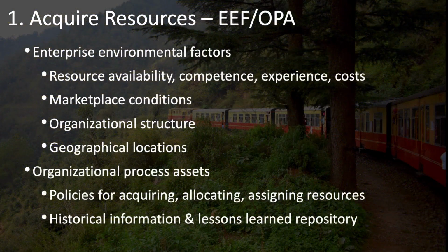Information about resource availability, the different competency levels of these resources, the experience that they have within your organization or other organizations on similar projects, as well as what it costs for these resources, are all part of the enterprise environmental factors that can influence your process of acquiring resources, as are marketplace conditions if you're looking to acquire resources and hire them onto your team, your organizational structure, which can affect how you need to work within your organization to acquire resources, and also the geographical locations that may be involved where resources may be located or where you need to do work.